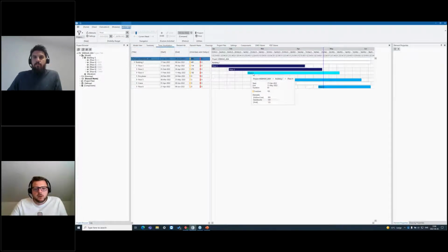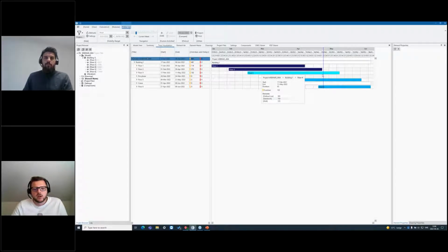But we see here on floor number 4, remember in the model, we had different colors. So the reason why we have this bluish color is that we are taking, for each of these activities, the lowest status, and highlighting that with color.